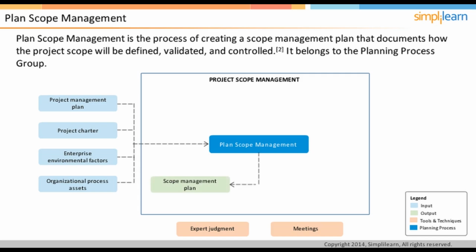The scope management plan describes how the project scope will be defined, like who will be involved in the process, whose inputs will be sought, what techniques may be used to get these inputs, etc. It also describes in what form the scope will be elaborated and documented, monitored and controlled, and verified. The plan may also describe how WBS will be created from the scope statement, how changes to the scope will be managed, how deliverables will receive formal acceptance, etc.